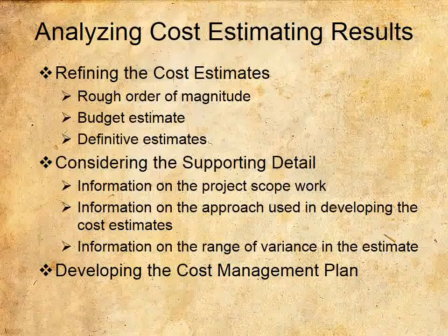Budget estimate. This estimate is also somewhat broad and is used early in the planning processes and also in top-down estimates. The range of variance for the estimate can be -10% to +25%.